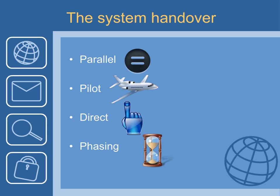You can also pilot the new system — give it a certain amount of time out there, take it offline, fix the errors, and then declare it ready. Or it can be direct, which is more like what was hinted at: the old one shuts off, the new one starts. Or there's a phased introduction where one department, then another, then another adopts the system — or one element of the system works, then another. For example, the sales department uses the new system first, then manufacturing, then accounts.